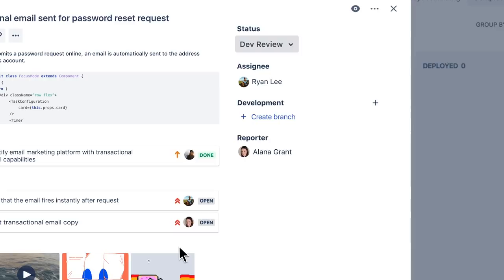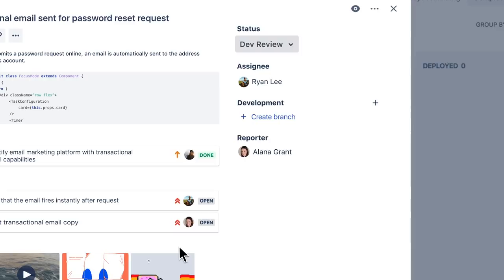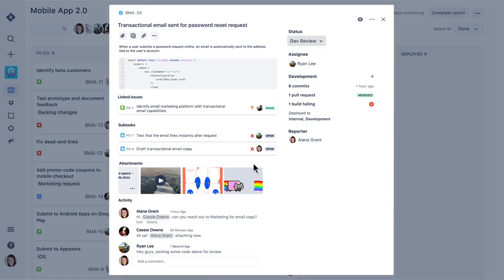Our engineering manager finds it valuable to see the dev status of a particular task, which gives him end-to-end traceability. Once he sees that all the builds are passing on a ticket, he can move it to done.